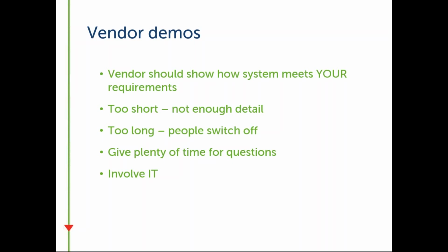In regard to logistics, realistically, unless you're in the market for a very large global enterprise piece of software, we'd recommend no more than 1.5 hour demonstrations with 30 minutes of questions. So you're looking at 25 to 35% of the overall time for questions, because once you've gone through this planning and requirement stage, you should already have some of these in place anyway.